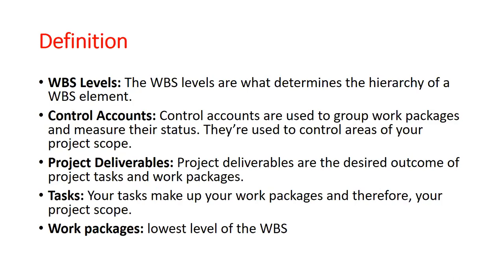And then under the scope statement, you have level 1, that's the WBS level 1, defining the major tasks or the major phases or the major deliverables for that particular project. So I could say phase 1 could be look out for a professional body and register. Stage 2 could be attend your trainings. Stage 4 could be pass your exams. Stage 5 could be go for your inductions, and then stage 6 is get your certification. Those are the major phases. So that's level 1, right?